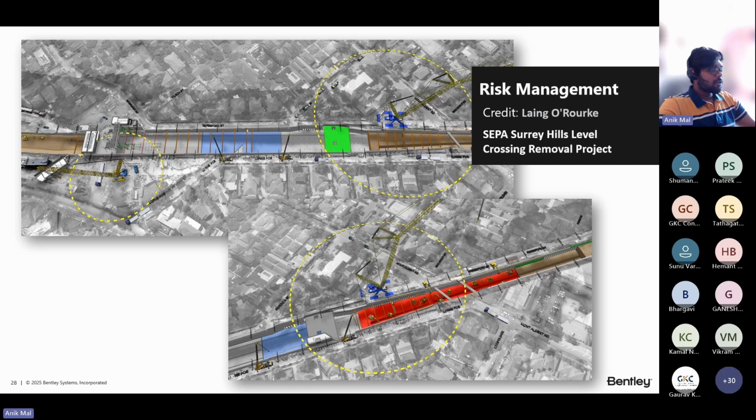The new Premium train station buildings were constructed using prefabricated, modularized structural steelwork frames. They highly mitigated the risk of assembling this on the site, as the area was very congested and they had very little area to work in on the site, and they had to keep the rail running as soon as possible.